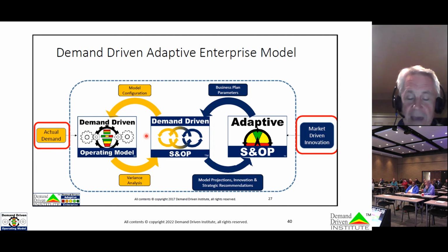Well, what's happened is that that material has become like the drum in your environment. And so you really need to understand what are the materials that are the most severely supply constrained? What is the rate that I can get them at? How can I collaborate with that supplier so that I give them appropriate signals so I don't misuse their production capacity? And then how can I use that understanding to better contain the amount of other buying or production I'm doing for materials that have not yet arrived?